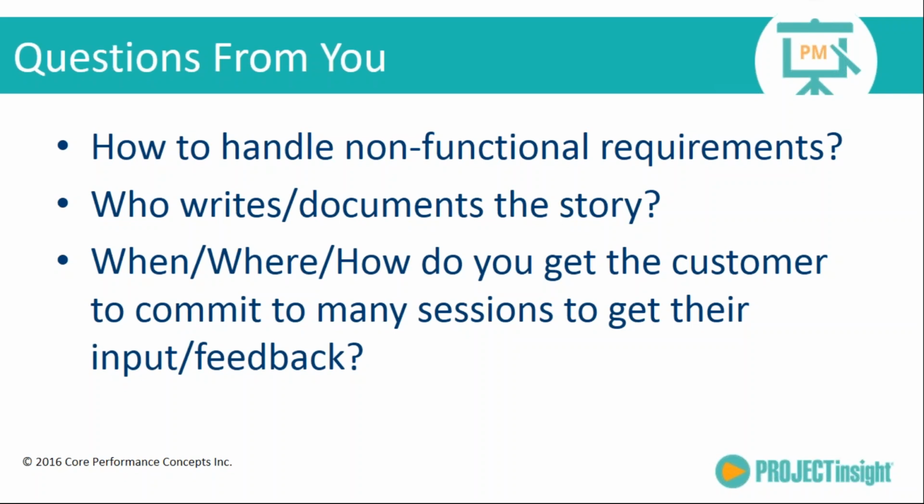So I look at handling non-functional requirements just the same way as functional requirements. They can certainly come up with a story that says what my performance should look like and how much uptime we should have, and there has to be some way to verify and test it. So I don't think there's really any difference from my perspective on functional versus non-functional requirements.